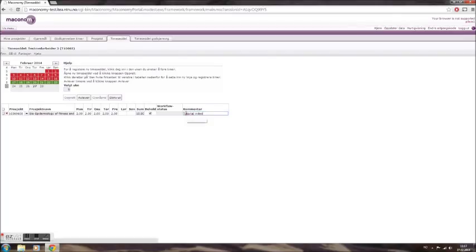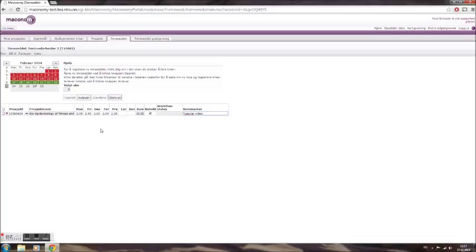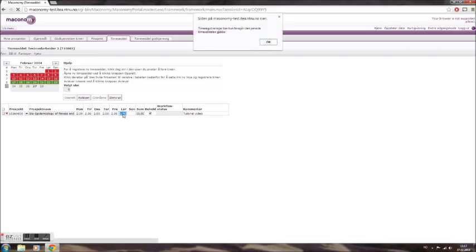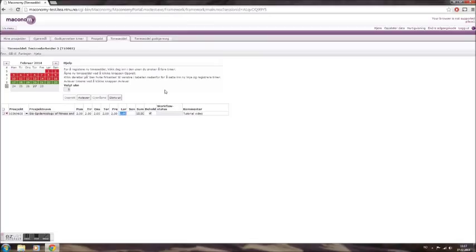In some cases, you will have weeks that stretch over two months. In those cases, you are only able to log hours in the month from which you selected the week. So if you select the last week in February, which also stretches into March, you will only be able to log hours in February and vice versa. Trying to log hours outside the current month will result in an error message as shown on the screen.